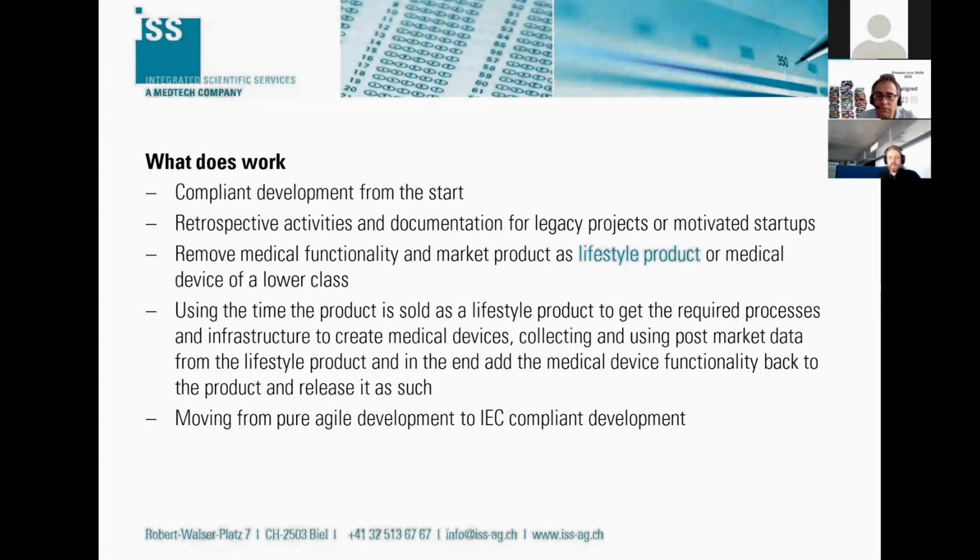So obviously, if you are a company and you start a product, what's going to work is if you do development right from the start. If you are compliant right from the start, that's usually with experienced developers that start a new product. It is possible to do retrospective activities for a product that's already started and suddenly became a medical device because you add new functionality, etc. But it requires some motivated parties, because you don't just add documentation, you actually need to retrospectively do some activities, and it will not be painless.